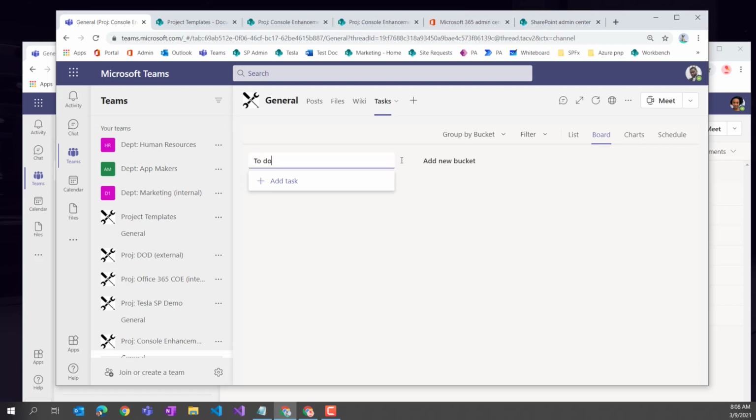The next thing I want to do is go ahead and create these channels. I use the standard agile channels. So I have a backlog, I have an in progress, I have a ready for review, and then maybe a complete. And then all these swim lanes, I can have these tasks pop up, and then users can create tasks and drive them, or if they're brainstorming, just fill up the backlog and be ready to rock and roll.